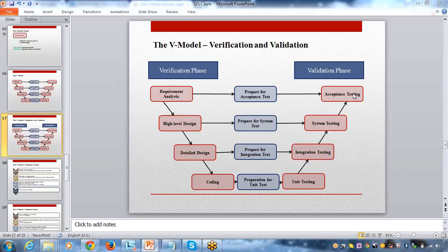So now right there, as a client, you will come to me and say that you want to develop your project within a month. This is your requirement. Now, as a team, we will go with the agile model, because within a month I cannot develop my application with the waterfall or V model. Waterfall means you have specific phases, and you have to complete each and every phase to move to the next phase. If you are doing it like this, one month is not sufficient time. So in this kind of situation, it is better to go with the agile model. Okay, clear?